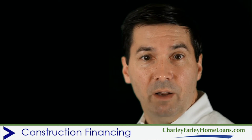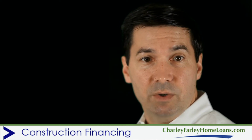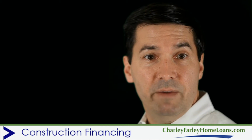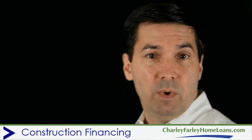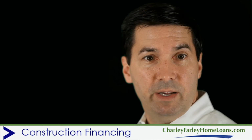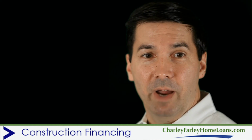As your home is nearing completion, it's common to make changes to the amount of your permanent end loan, depending upon cost overages, underages, additional preference items that you added during construction, and any additional savings that you might have to put towards reducing the end loan amount. Once the construction is complete and you have the certificate of occupancy from your town, you can close out the temporary construction financing with your permanent end financing and live, hopefully, happily ever after.